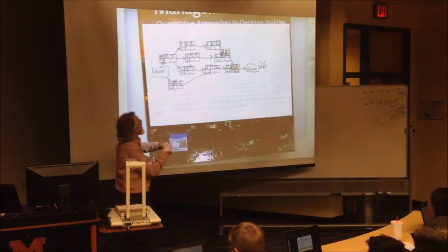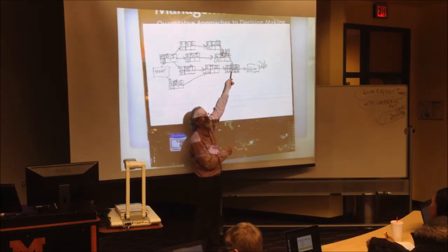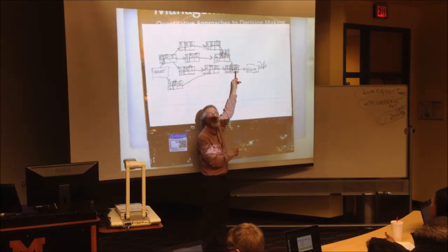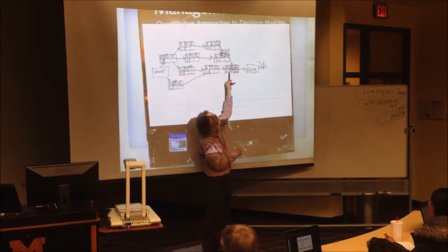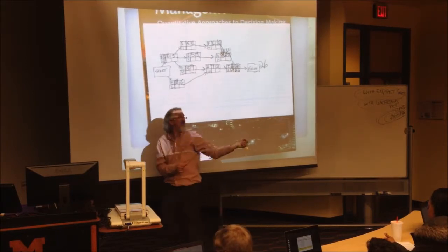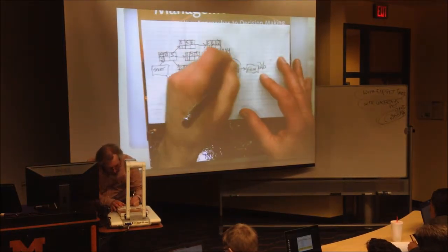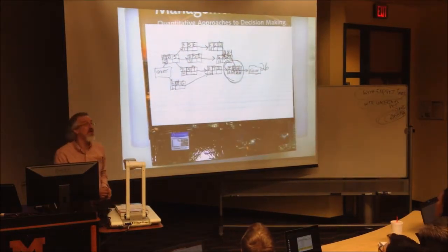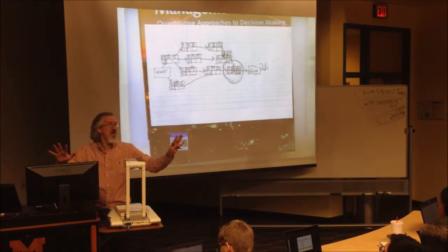Look, this is called the earliest finish. This is the earliest start. This is called the latest start. This is the earliest finish. This is called the latest finish. If I subtract the finishes or the starts, I get 0. I'm going to circle that. I just found what's called a critical activity, meaning there's no room for any slack here.